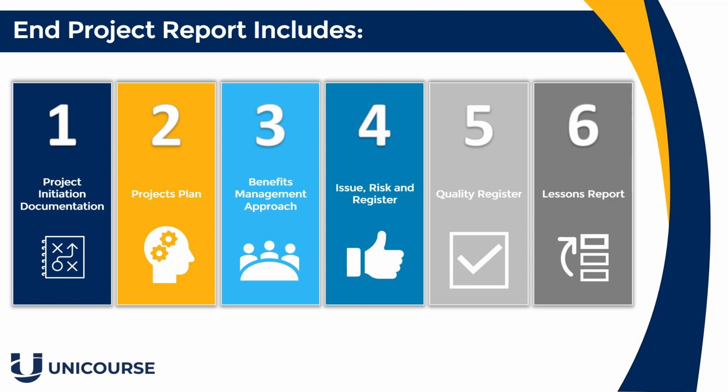Identifying them and understanding them, communicating them and the impact is really important to address the issue. You can look at different ways of doing this, but delegating responsibility of action is really good, and setting a date for completion to resolve that issue or risk is important as well.